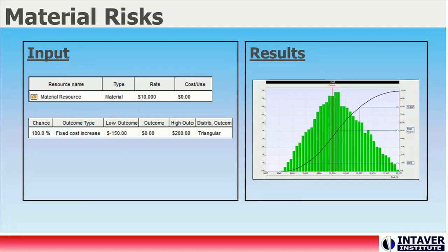Material costs are treated similarly to fixed costs when it comes to risk events. Material costs can be risked using the outcome type fixed cost increase; the relative cost increase outcome type does not work in this case. In this example, we can see how we can apply a range of possible rates for the material and its presentation on the chart. In addition, if you are using cost type resources, which are similar to material costs, cost type resources can be risked for each specific activity using the same method.